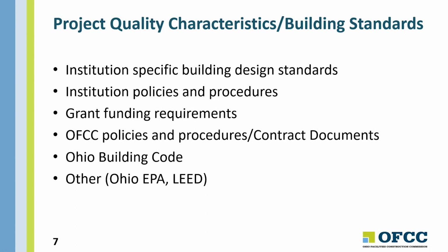The Ohio Building Code is a necessary part of any construction project. It typically applies to most projects unless they're agricultural in nature or maybe military in nature. So most state property plan approval goes through the Ohio Department of Commerce, Division of Industrial Compliance, Bureau of Code Compliance.